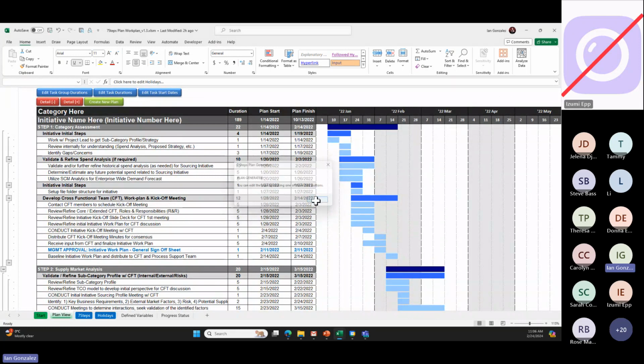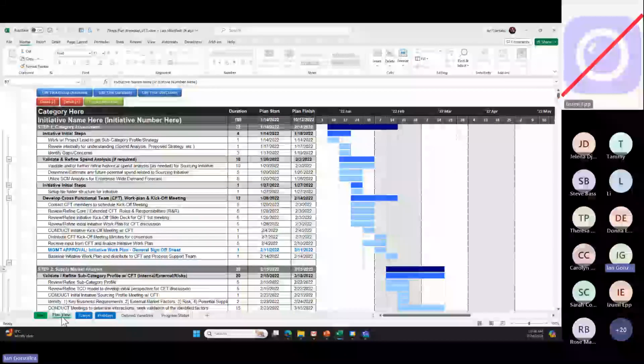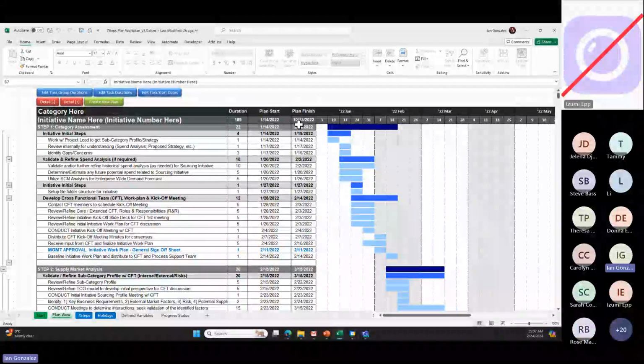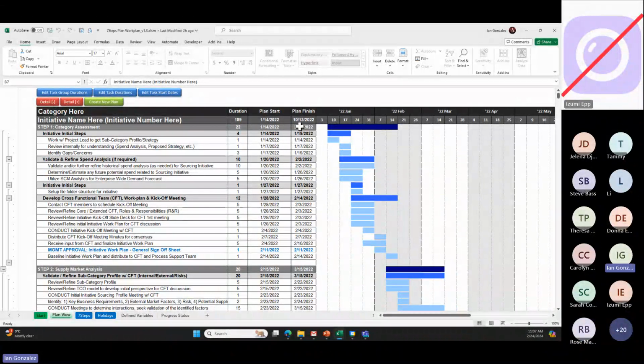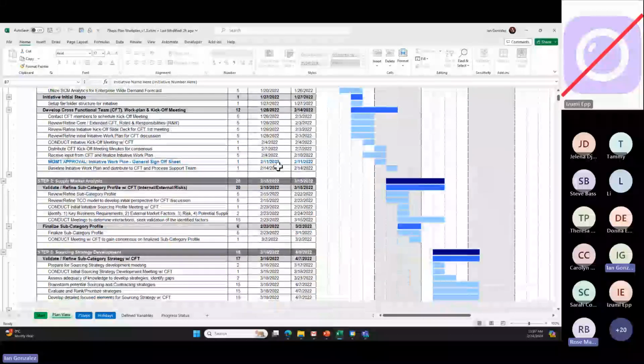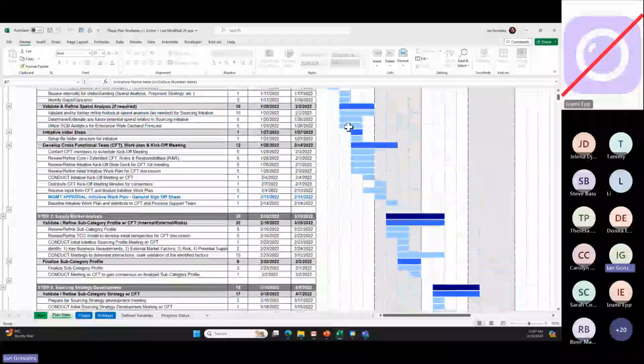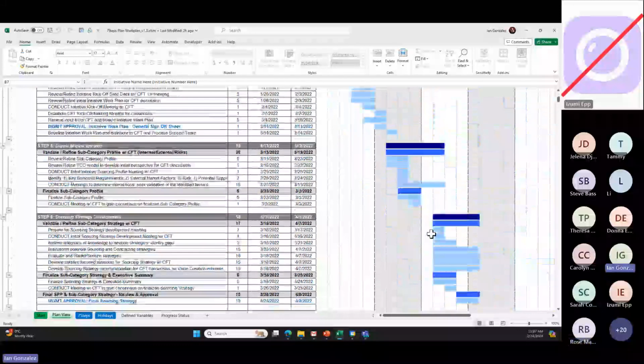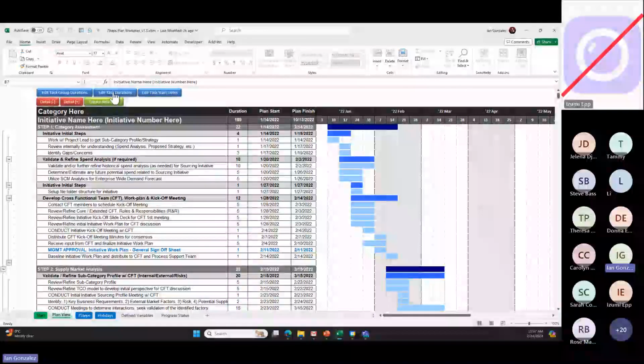So, with the way our 7 steps was set up, if I plan to do these things on January 14, 2022, I will finish about October 13, 2022. So you see already the start dates. Actually, you see the start and end dates for everything, for every step. And on the right, it's your Gantt chart for the entire step. This is your project plan, and then I'll show you how these buttons work.